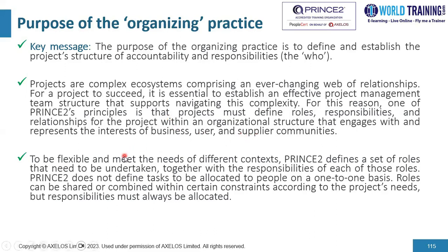Now, to be flexible and meet the needs of different contexts, PRINCE2 defines a set of roles that need to be undertaken, together with the responsibilities of each of those roles. PRINCE2 does not define tasks to be allocated to people on a one-to-one basis. Roles can be shared or combined within certain constraints according to the project's needs, but responsibilities must always be allocated.